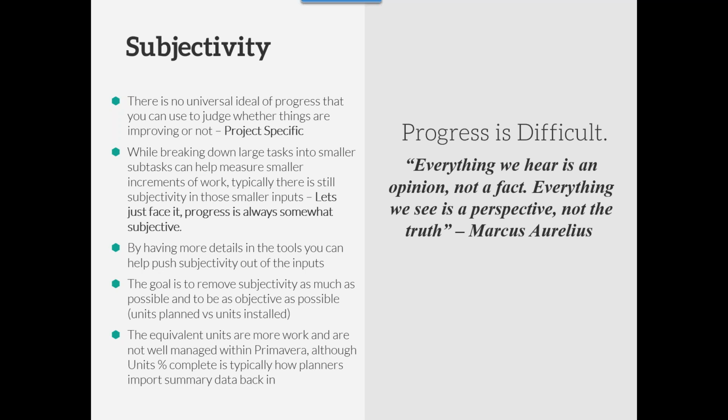and where we're seeing examples. Because while the equivalent units are more work, trying to do all of that resource management and input in Primavera, oftentimes we see the superintendents in the field have a hard time reporting it in, especially when you're burying multiple resources on a single unit. So using a tool like Excel or a tool like Cloud EPC can help mitigate that.